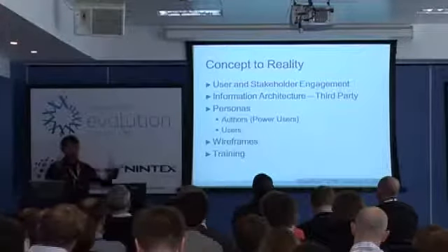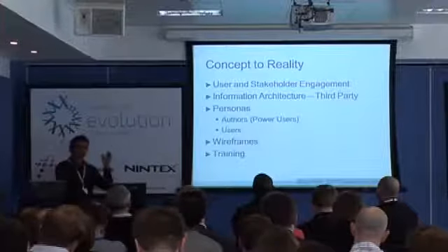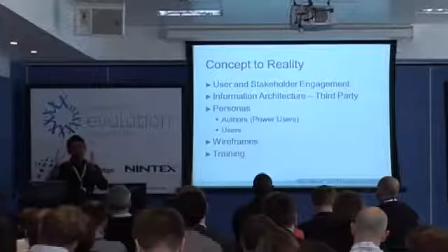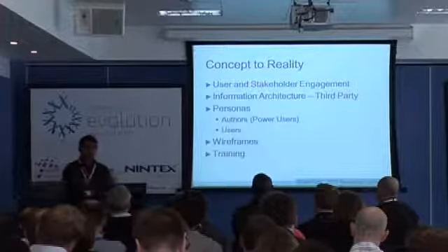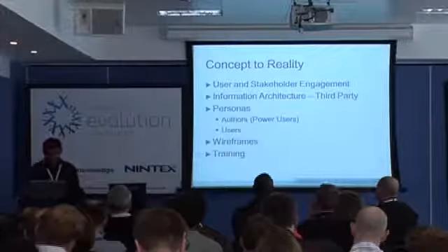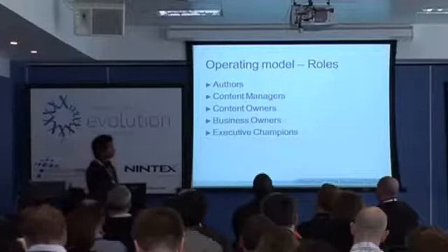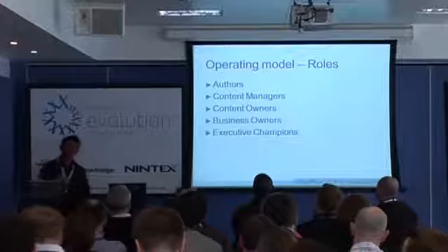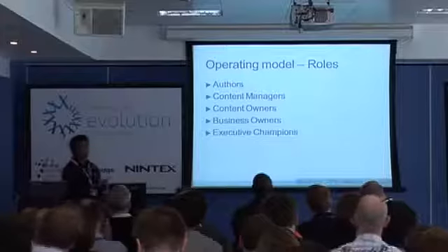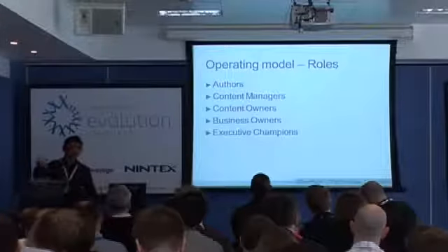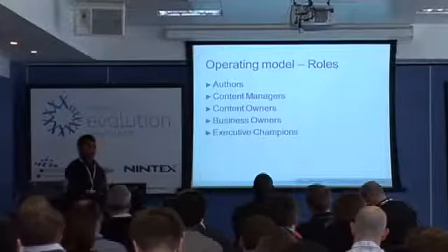Created a lot of wireframes to go through the design. So the design you saw was broken down into structured wireframes so that you could identify which were the content areas, which were the editable areas, and so on and so forth. And a lot of training as well, so that people knew what they should be doing. So I talked about the operating model and roles. It is quite important that up front you talk to users and say, you are a content author, here's what it is that you need to do, and also you need to get some executive champions and guidance so that people actually buy into that, so that they will start using what you built.